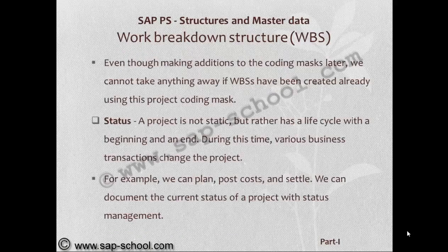Even though we can make additions to the coding mask later, we cannot take anything away if WBS elements have already been created using the project coding mask. Now let's see the next setting, which is status. A project is not static, but rather has a life cycle with a beginning and end.